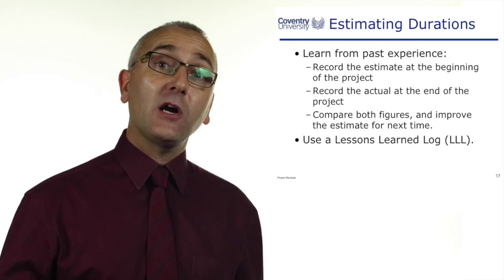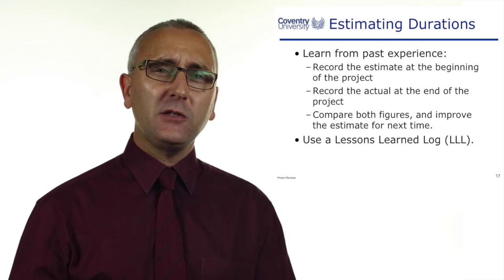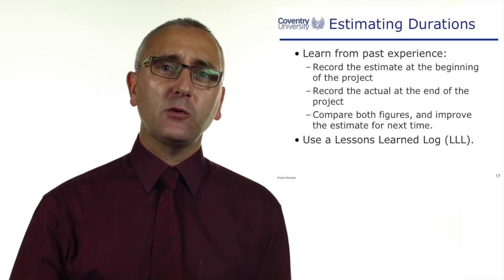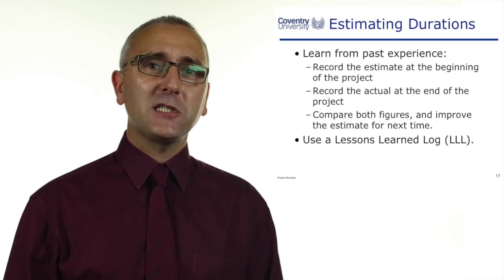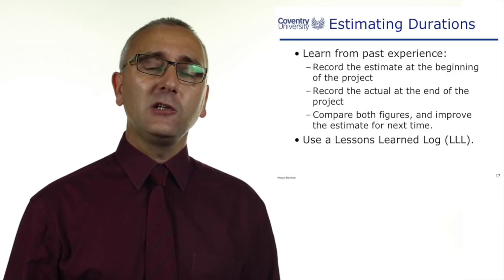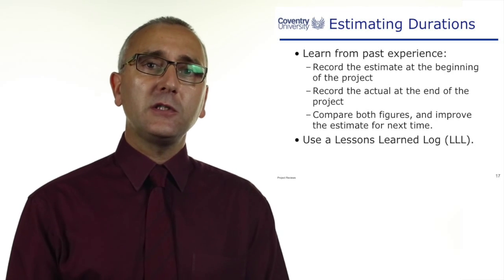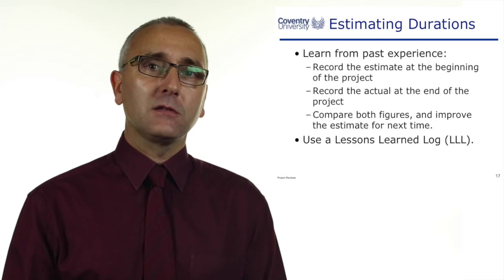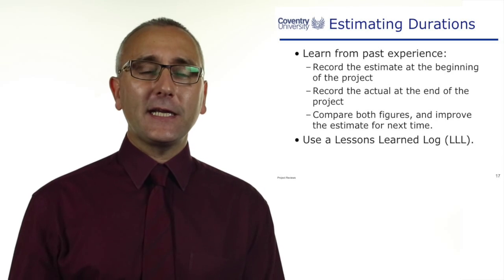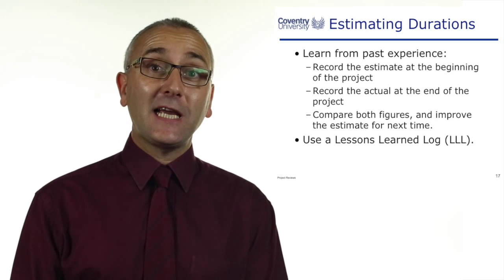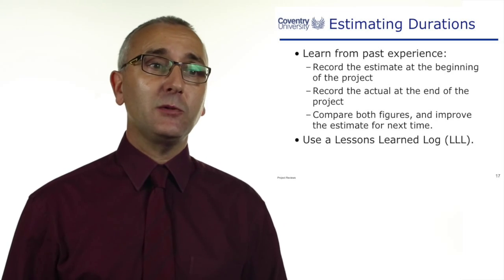Open and honest. When the person has done 40 hours, you say, 'You said 20, it was 40 — why was that?' And he says, 'Well, I was a bit optimistic.' Good. So if we're doing it again, what should be a good estimate? 'Well, I think I could do it quicker next time, but maybe 30 hours is probably a better estimate.'